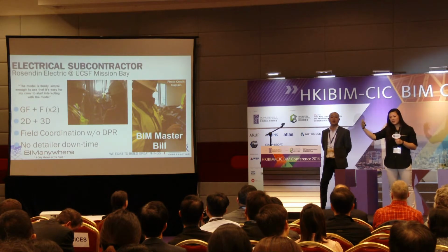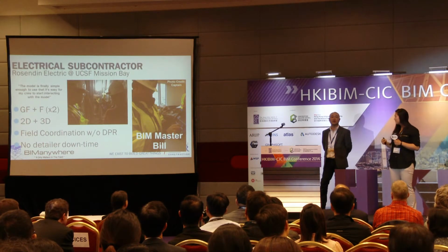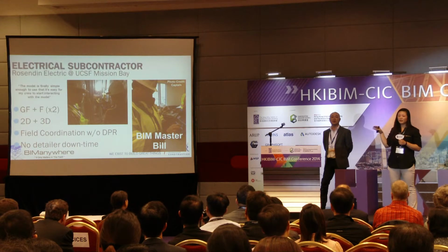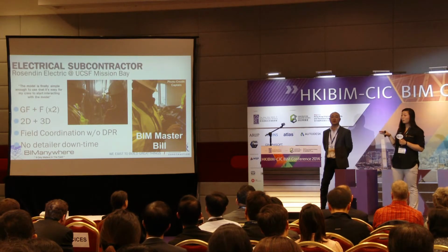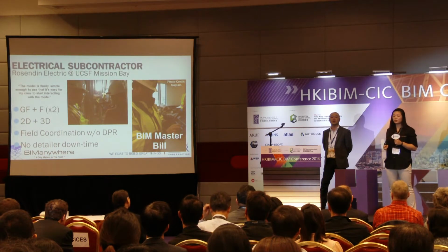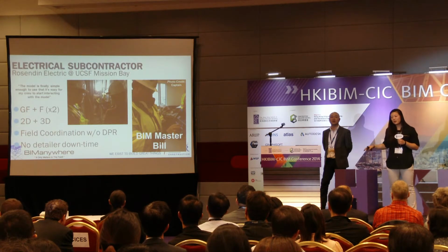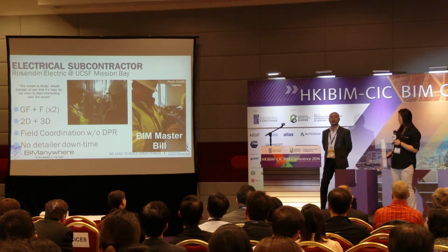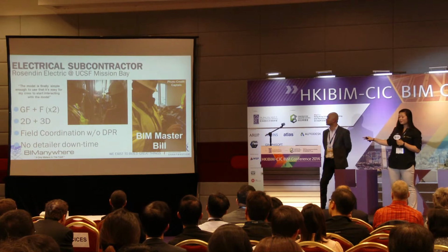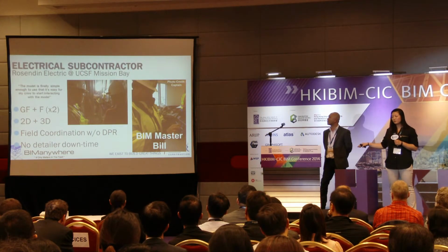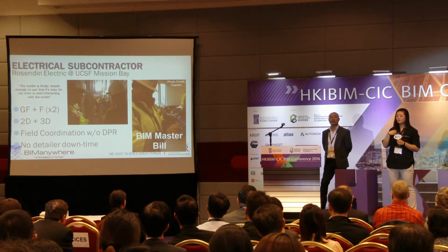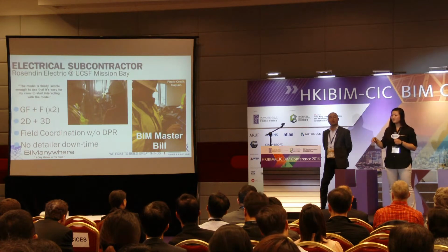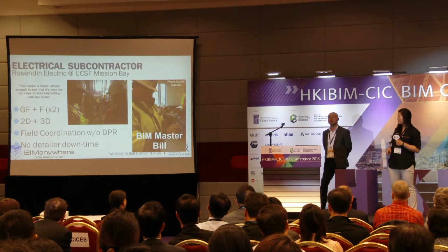So just letting them visualize really gives them an idea of what that space is supposed to look like and what they should do to help out the other trades. So there's a lot of in-field collaboration as well. With the subcontractors using this, they can actually do field coordination without DPR. So we don't even need to get involved, and they can solve field issues on their own.